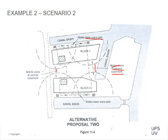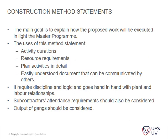Construction method statements have the main goal of explaining how proposed work will be executed in light of the master program. Key uses include defining activity durations, resource requirements, plant activity details, and producing easily understood documents that can be communicated to others. They should be disciplined, logical, and go hand in hand with plant and labor relationships. Subcontractor attendance requirements and gang outfitting should also be considered.